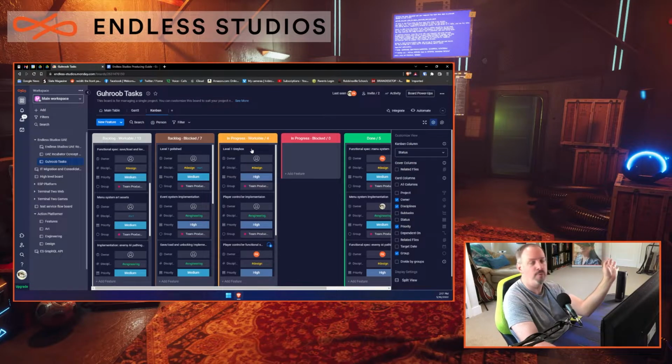They only move forwards, right? So you never take something, for example, and this is the big no-no, and go from in progress and put it back in the backlog. That's a party foul. We never do that, right? A producer or someone, if you had a QA process, for example, and someone identified that something you thought was done really wasn't done or wasn't done adequately, they can make the move from done back to in progress, right? But other than that, things don't move backwards.